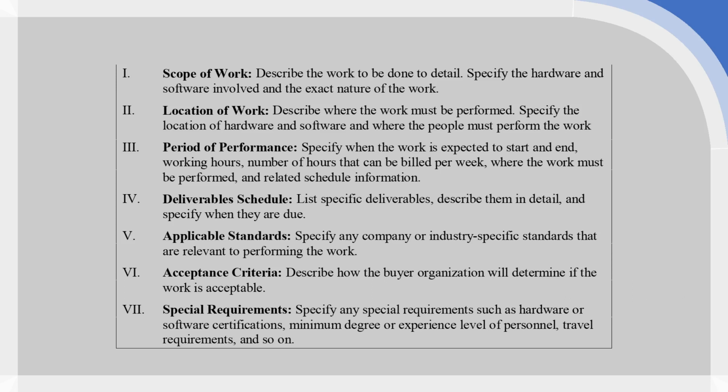This covers pretty much all of the different types of input, from labor to materials to components. But if you're looking to just specify a statement of work for labor input, you're not going to use things like deliverable standards. Even applicable standards may be empty as well. Acceptance criteria will certainly need to be present. Periods of performance, location, and scope would need to be present as well. But you wouldn't be using sections 4 and 5, generally speaking.